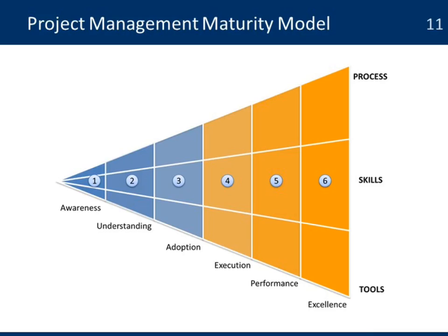The project management maturity model is not just a view of what the organization is, but it looks at 3 elements, 3 components: the process, the skills, and the tools. An initial assessment of an organization might say that yes, we have a good level 3, we have the process, the methodology. Even the tools could be very sophisticated. We are at that level where we have an integrated tool, we have a project management information system, but my skills could be very low, maybe here. Whatever is the lowest denominator, that's going to be where you are in the organization.